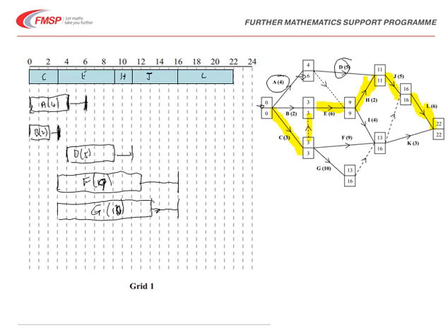If we look at I, it can start at 9. It must be finished by 13 because it's of length 4. So I can start at this point here. It's duration 4, so it must be finished, or could possibly be finished there by if it is on time. However, there is a float also of 3, so bring us as well up to 16 here.